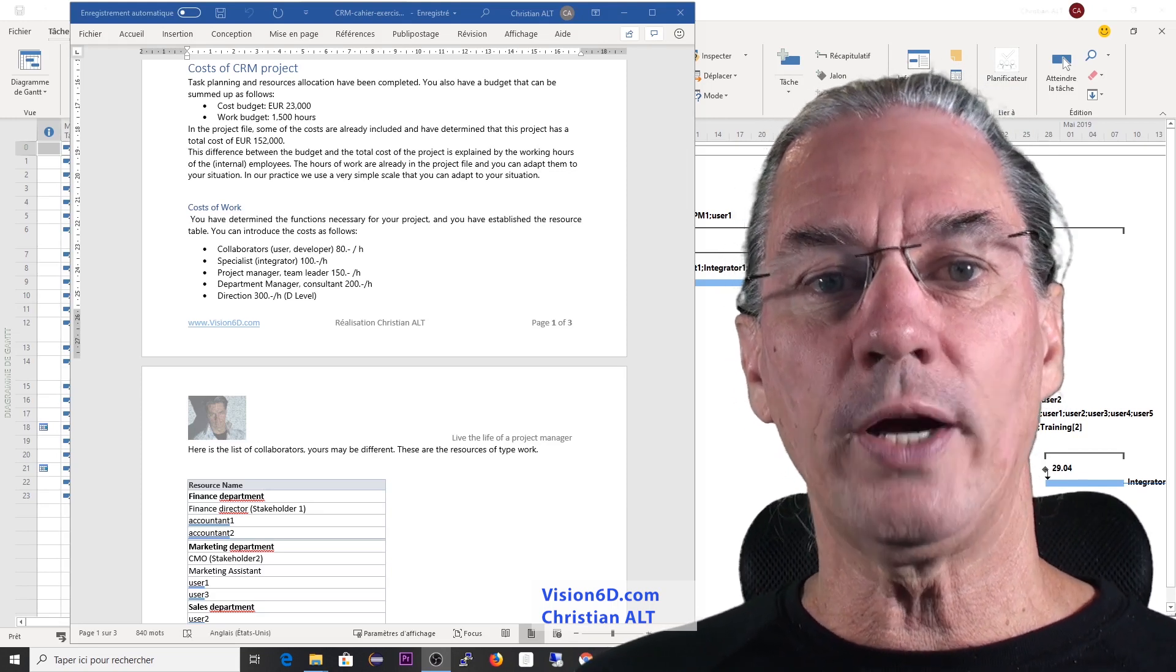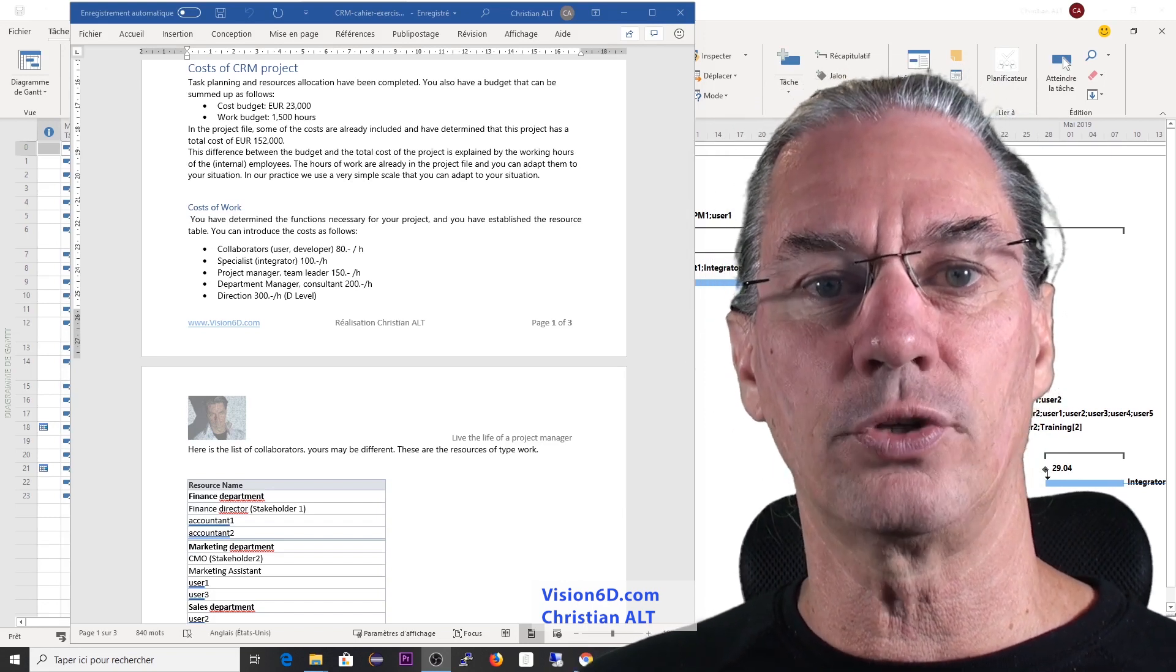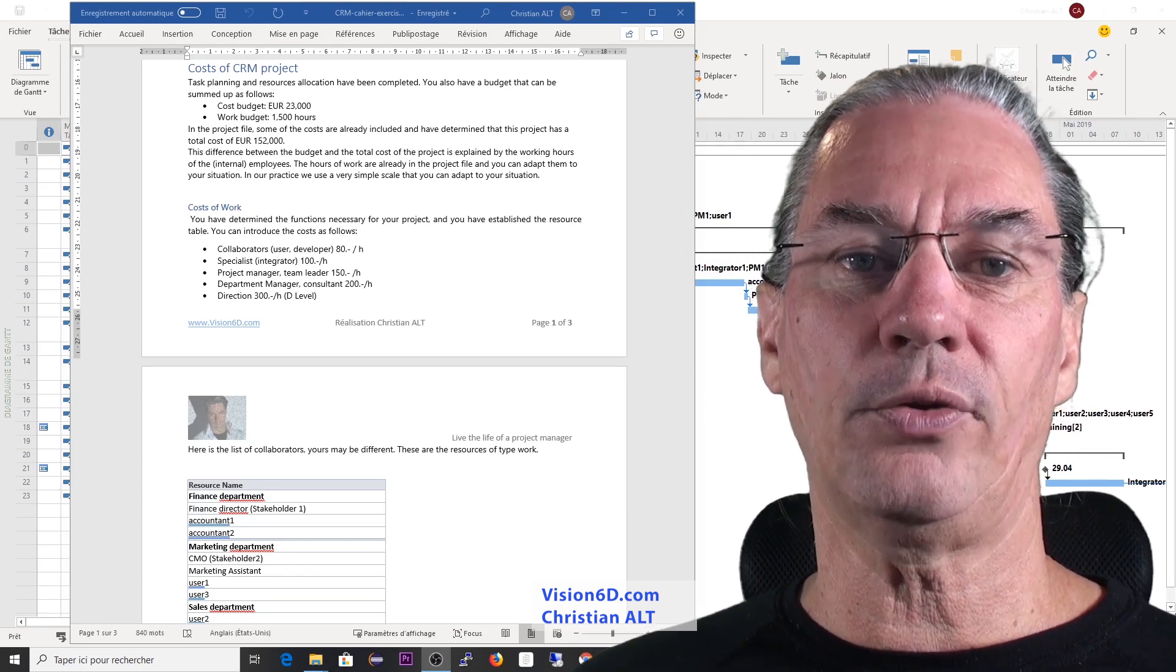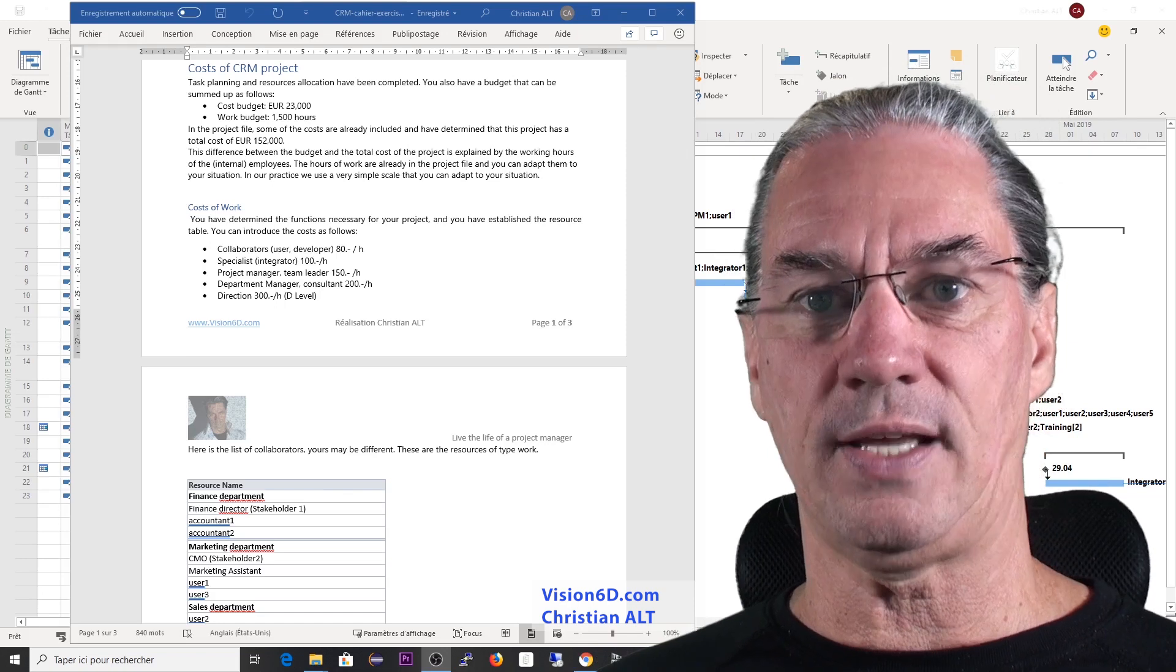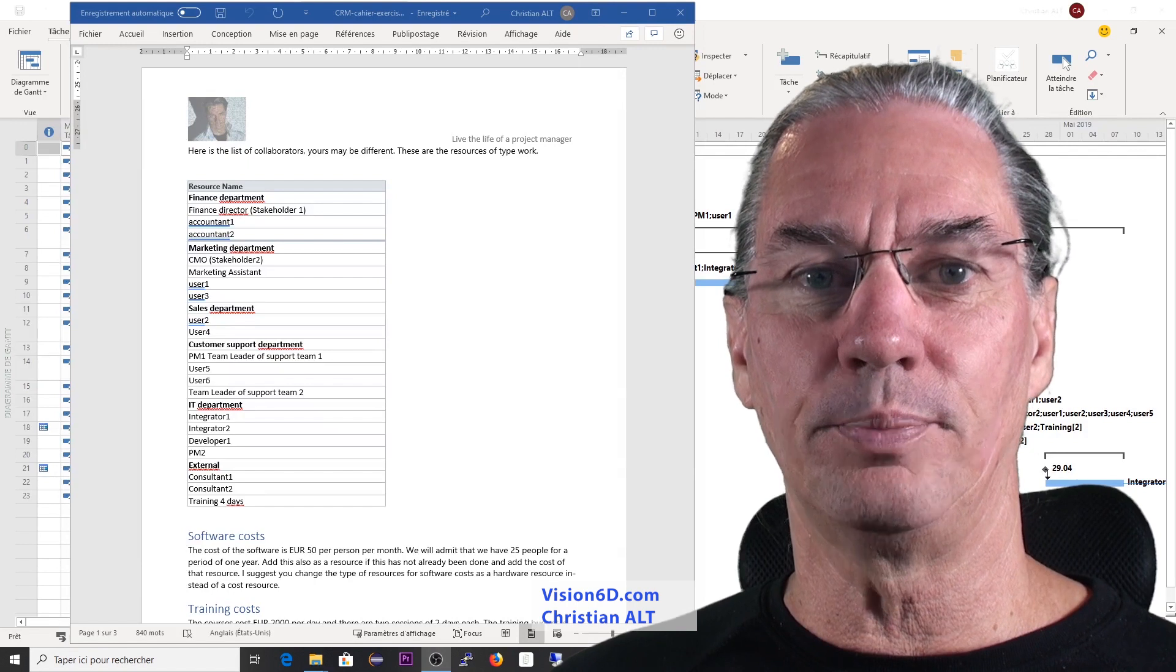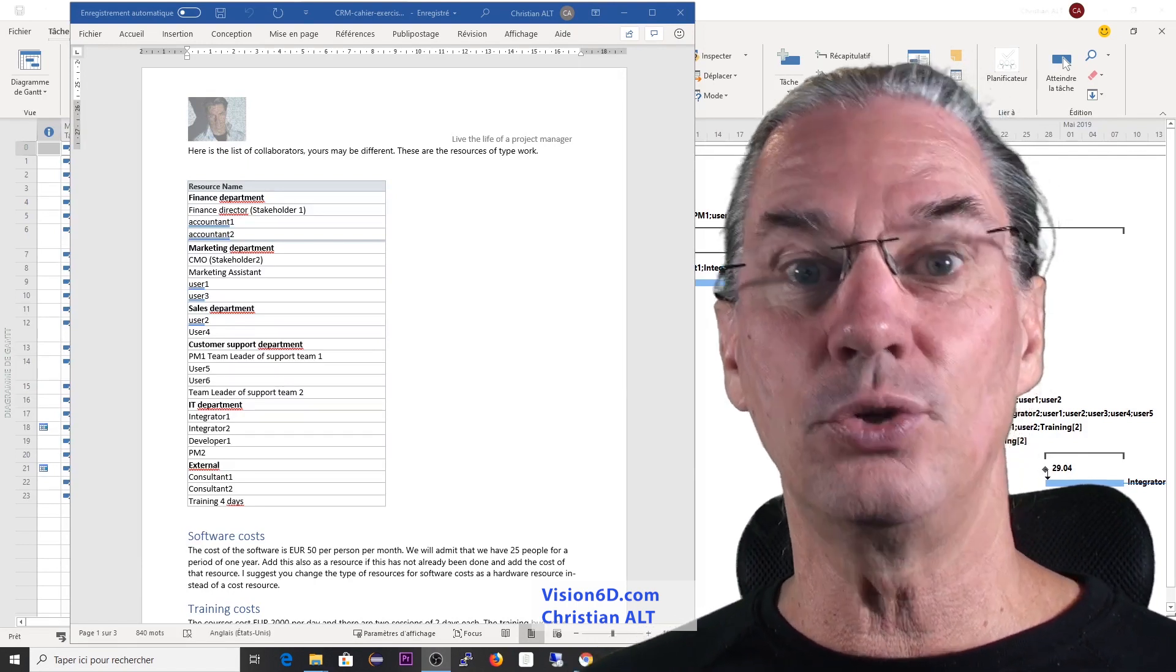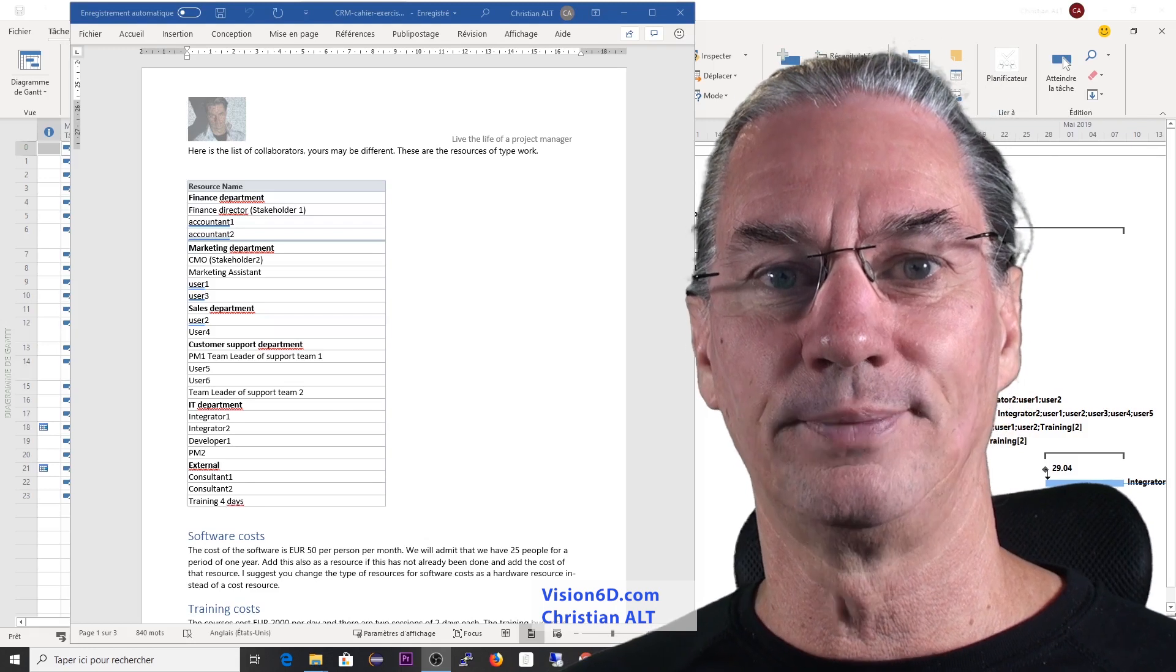And if you require, for example, a stakeholder and you want to involve him in the cost calculation, it's a D-level person. So for this, it will be 300 euros per hour. Of course, you can set your own rates. I have established the list of the people working in the team of the project, but what is interesting is that you define your own resources working in this, because in the end, it's your project.